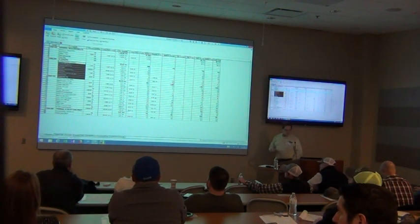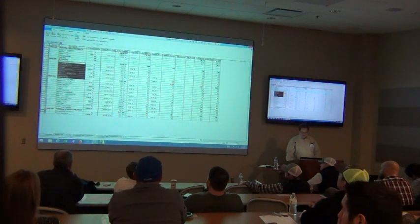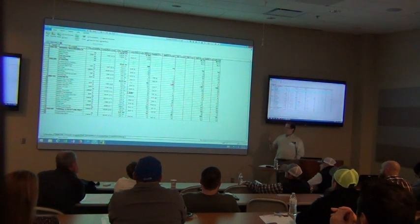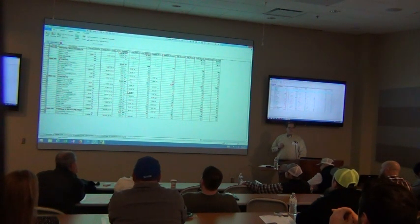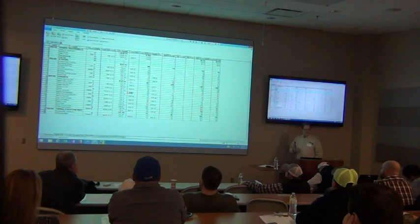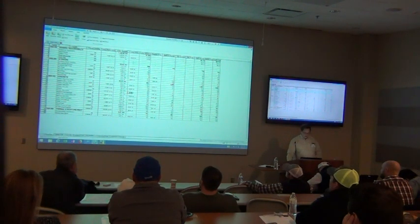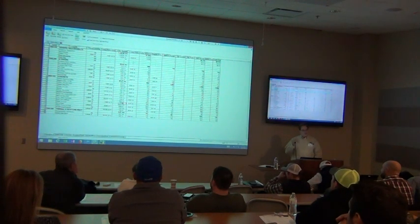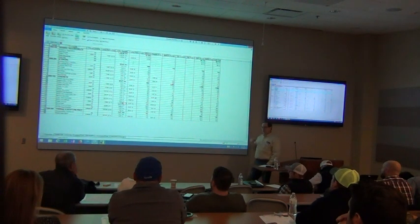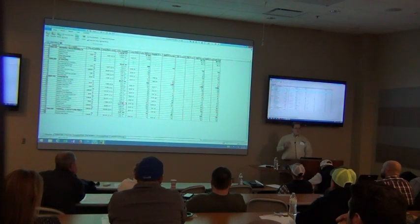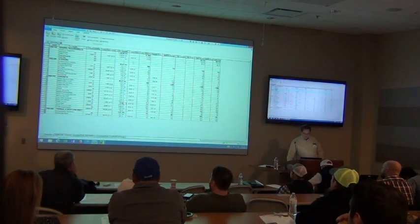The database is a lot like a starting-out point. Once I get into the spreadsheet, it's my ability to change whatever. If I know this job is going to be on a rough site or somewhere odd where I can't deal on a regular basis — maybe I've got issues getting the concrete in there — instead of the three hours initially estimated, I'm going to say it's going to take a whole day. I can sit there and put those what-ifs to it.